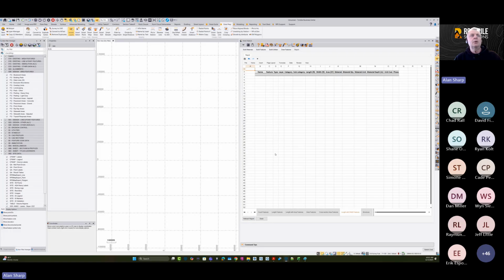So if you calculate some things, and I'll show you a little while, like a cross-sectional takeoff approach where we can actually do cross-sectional area takeoff, build the report, and then we can just add formats in here for the end section area calculations, for example, to build out a spreadsheet that does all the quantities for the end section areas directly from a takeoff from a 2D set of cross-section plans, for example. So there's a lot of things you get out of this. And of course, this flexibility of this report means we can just add more columns to this and do our own calculations as part of the process of delivering new reports.